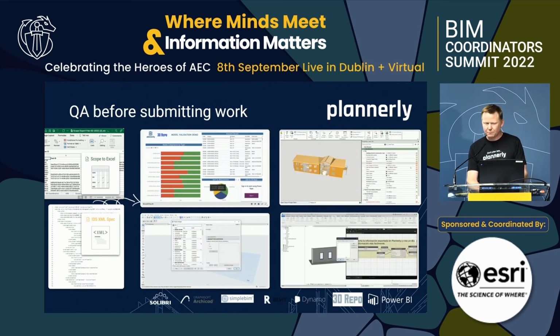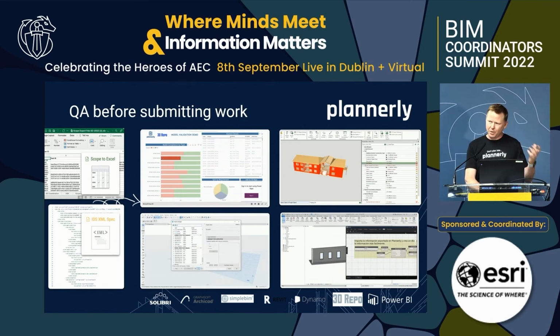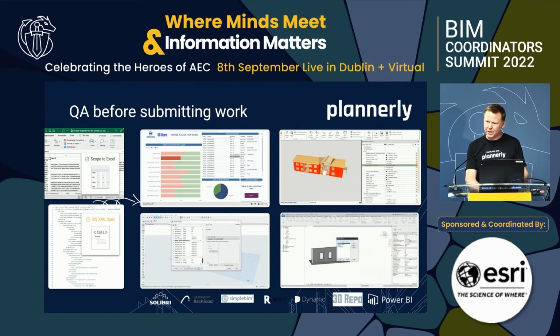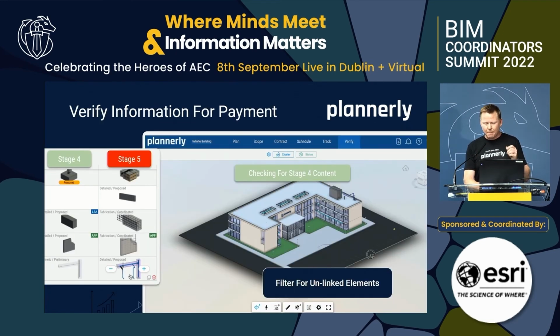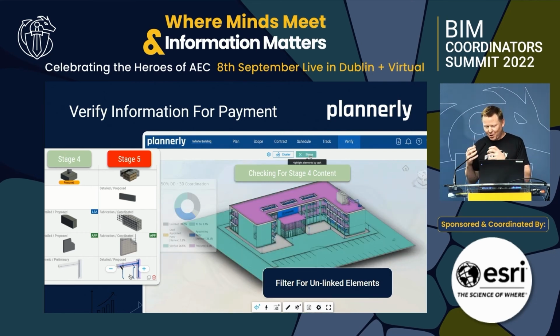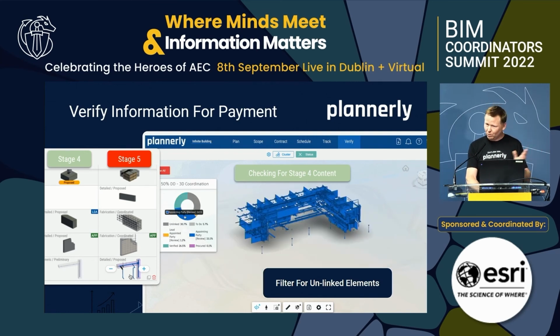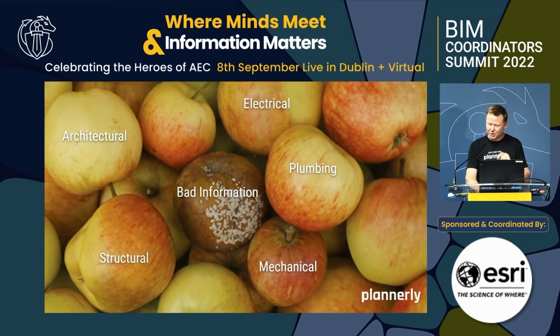So lots of other ways of model checking, but the principle is to QA the model, QA the deliverables prior to the person that was receiving them and being able to give them machine-readable scope, machine-readable requirements. It makes it a lot easier for them to do that. The last part is verification of the content that is accepted so that payment can happen. And if we can tie all of that planning and contracting and verification through to payment, then that's the true carrot that we can achieve. Because if we have one bad piece of information, we know what happens to the fruit bowl when it looks like this. Unfortunately, very rapidly the rest of the fruit are infected.